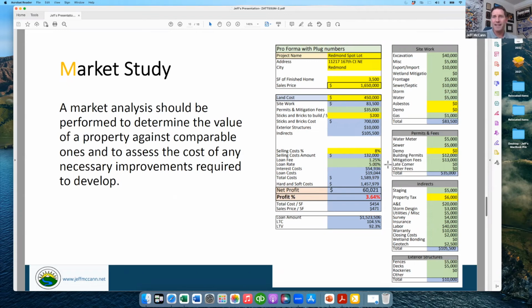And this analysis said, you have to give it away. And in fact, the builder wouldn't do it for no profit. So I said, they're probably going to want to make 15%. So you probably have to give the builder the property and a check for $150,000 or $75,000, whatever it was, which obviously the seller was really upset about. But what happened in that case was the wetland mitigation fees. In order to do this, we could develop the property, but the wetland mitigation fees were going to be $720,000, done by doing buffer and wetland improvements elsewhere on the property.